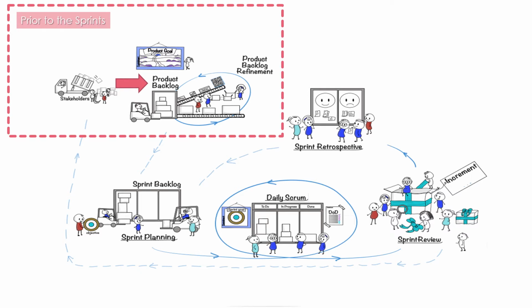In Scrum, we do not wait until the product backlog is 100% prepared with all the details to start the sprints. We start the sprints as soon as the product backlog is mature enough for the near future, and keep updating the backlog all the way through the project.